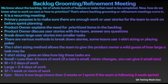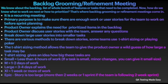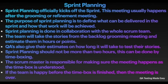T-shirt sizing gives the product owner a rough estimate of how large a task may be. Sizes can be small, medium, large, and extra large — and there's 'epic' for tasks that are simply too large. Small is less than four hours of work, medium is one to two days, large is three to four days, extra large is one week or more. Everyone working on the stories should be in the grooming session, including the product owner and Scrum master, who drives the whole session.